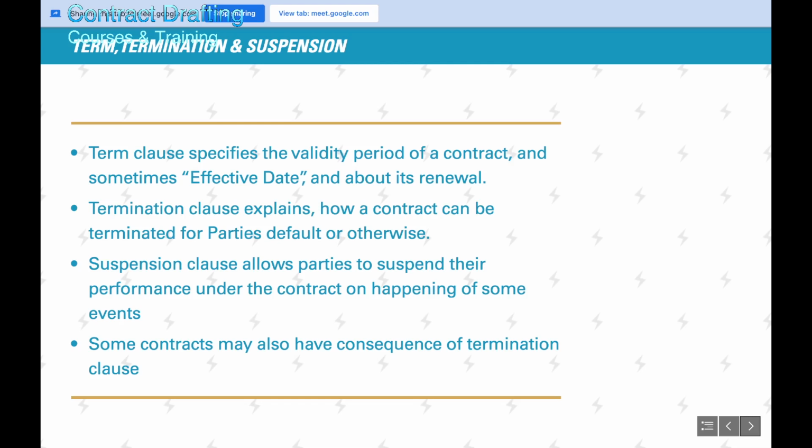Let's say your client is a large project company which is constructing a project, you are a contractor, and your subcontractor will end up suffering if your client suspends for XYZ reason, let's say for non supply of coal in a power project. Then, in that situation, your client may suspend, give you compensation for those period, or give you a time extension for that period. So similarly, you want to have a clause on a back-to-back basis with your subcontractor.